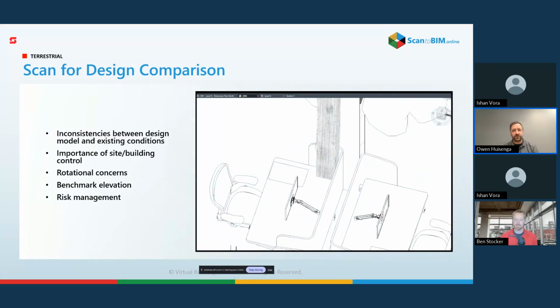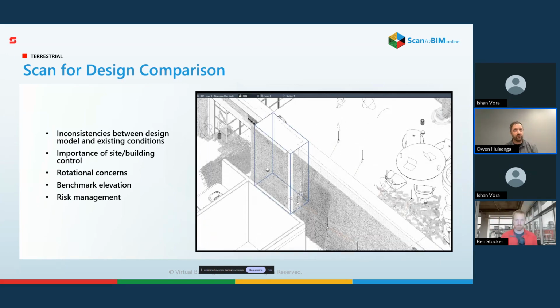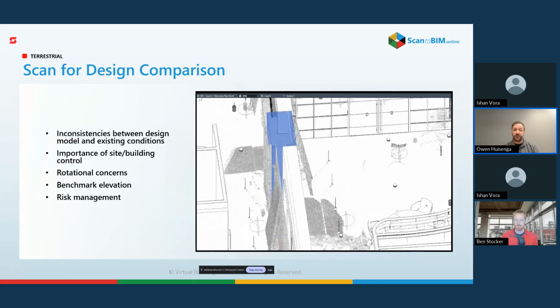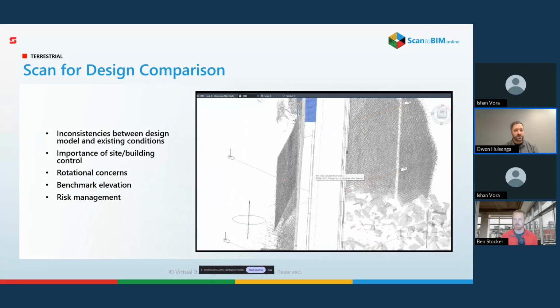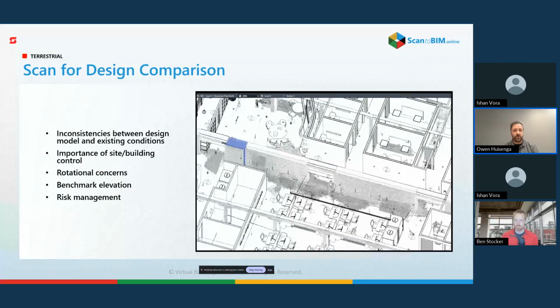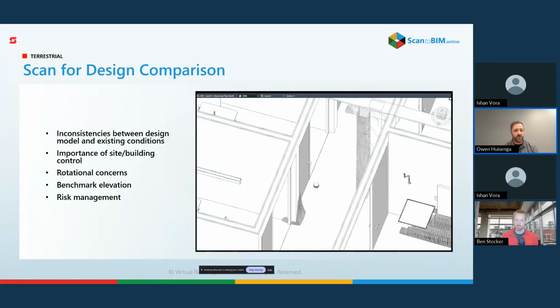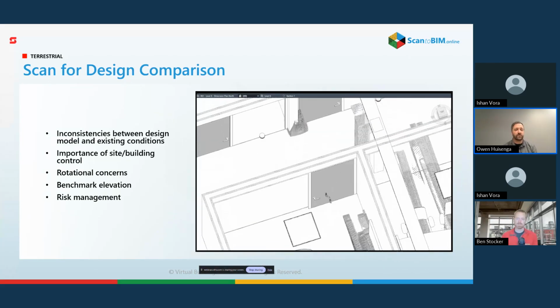Interior fit-out projects are extremely fast-paced, and they often require a much greater level of engagement, particularly on-site engagement from our architect. Usually when an issue is identified, it's identified kind of late in the overall process when compared to a ground-up job. And that really limits the opportunity and the time for anybody to respond.